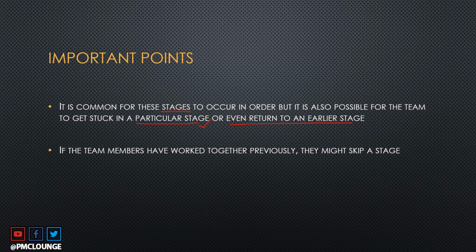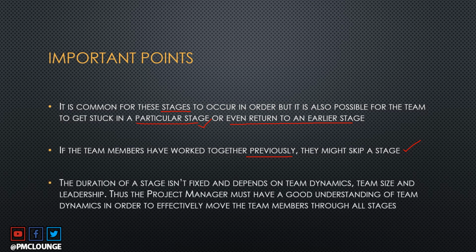If the team members have worked together previously, they might skip a stage. So if there's good camaraderie between the project team members, it is possible that you don't see a storming stage in your project itself. Finally, the duration of the stage isn't fixed. Very, very important.